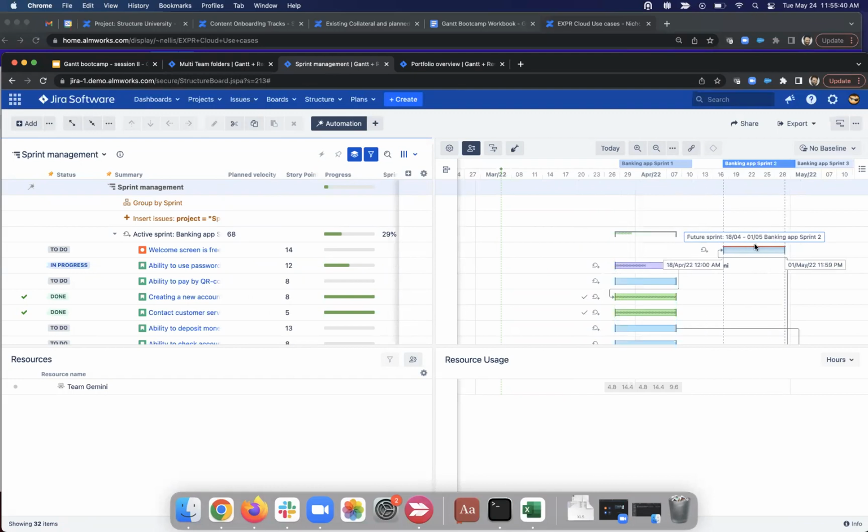So there's not a way of showing the sprints all the time. But when we're trying to move things from one sprint to another, we will show them. The reason it's difficult is because we can have an unlimited number of projects in the board. So if we've got 20 projects with 20 different sprint durations and settings, that would be a ton of noise to put on the board all at once. So this way we're only looking at the relevant sprints.